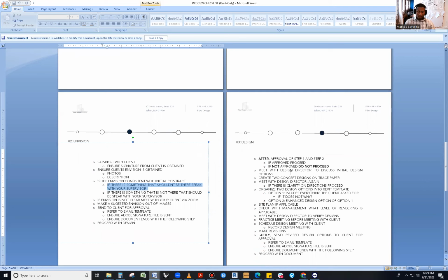If not approved, do not proceed. Meet with design director to discuss initial design options. I believe that we should meet with, in this case, the design director, Julio Gutierrez. So meet with Julio Gutierrez before you start sketching.